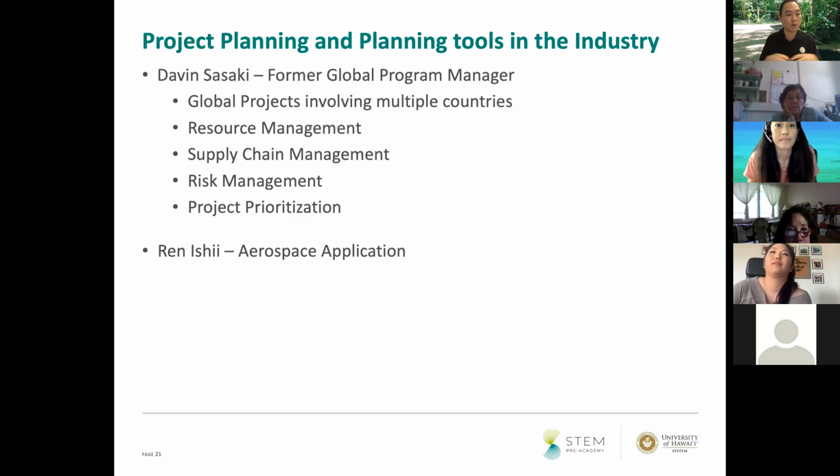Boeing builds a plane, but they have a lot of suppliers. If one part doesn't come in on time, it may hold up the whole production, and you may not want that. The company that I worked for was a manufacturing company, so getting parts in time was very critical for us. If it didn't come in, then we could be late in delivering our overall product.